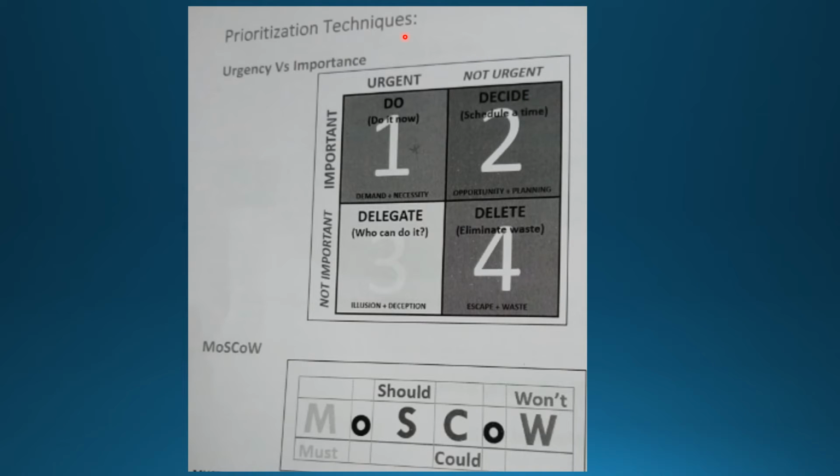I told you about prioritization techniques. It's one of the keys in the DEEP principle. In DEEP, P is for prioritization. What are the different ways a product owner looks at prioritization? You can create a map of urgency versus importance. Focus on high important and high urgent items, then go with the high important and less urgent ones, and then follow with not important but high urgent ones. You can remove items that are not important and not urgent because they are hardly needed by any customers.